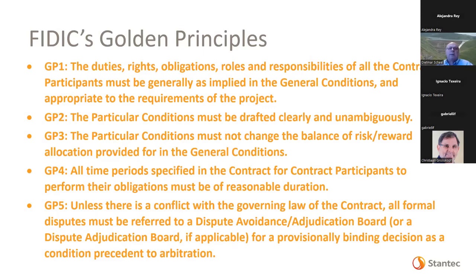Number 4, all time periods specified in the contract for contract participants to perform their obligations must be of reasonable duration. Some clients cannot pay within a certain time window. They require something a little longer. There are internal processes, which is fine. You can extend these things or even shrink a few, but whatever you do, you've got to be reasonable.